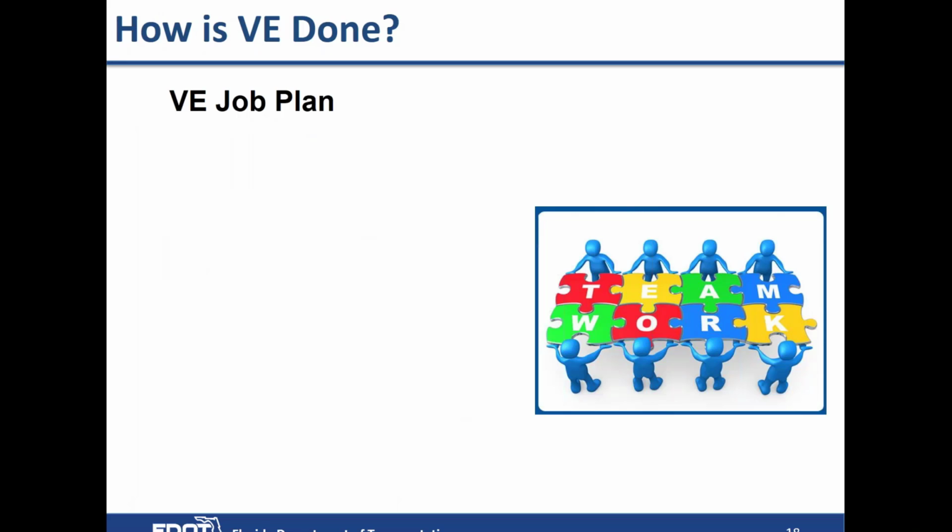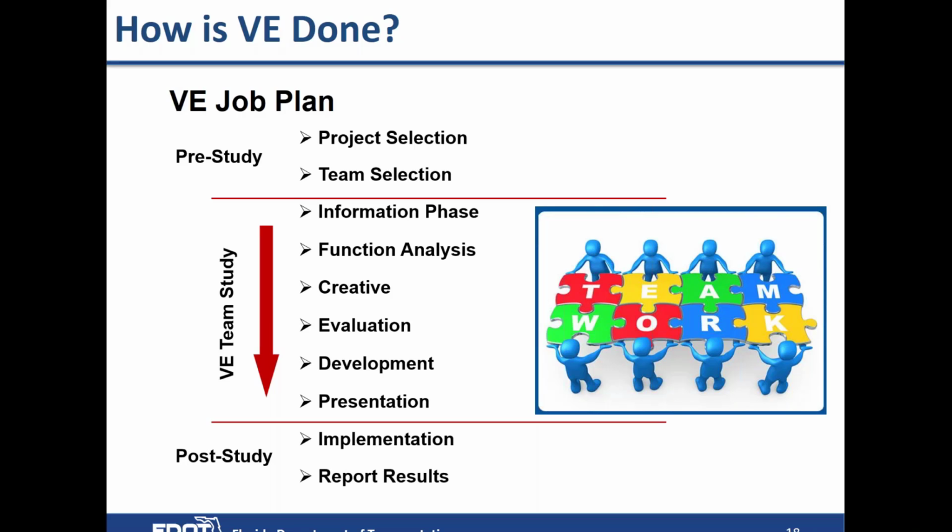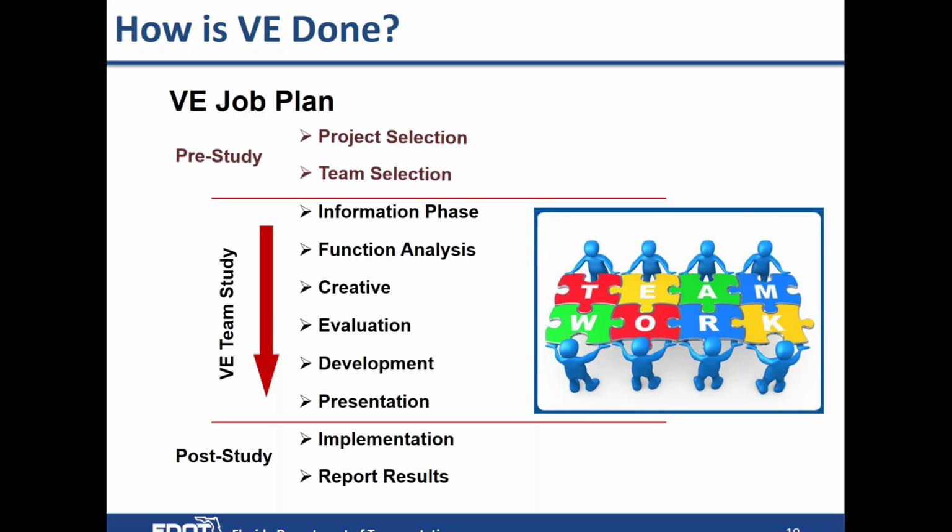How is VE done? Well, there's something called the VE job plan, and that includes pre-study steps, what is done, the steps taken during the VE team study, and also some post-study steps, which would include implementation and reporting. So let's look at the pre-study.